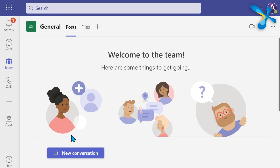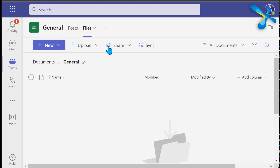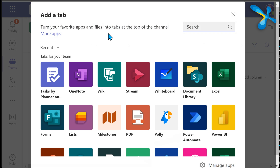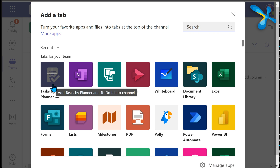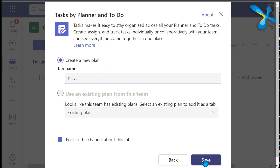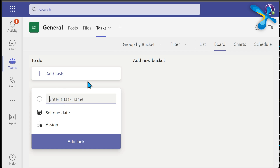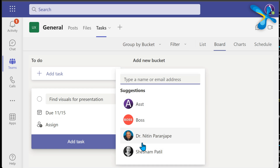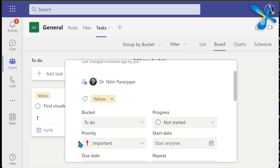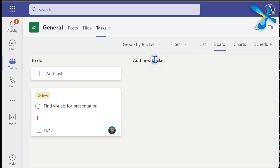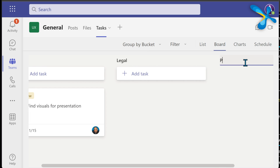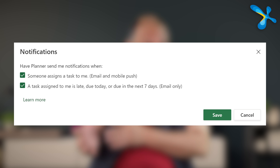In a Team you have conversations and files, but where do you add tasks? Click the plus sign and add Tasks by Planner — it's a shared task list. You can add a task, delegate it to project members, set a deadline, add sub-tasks, apply color coding, create buckets for various task categories, and more. The other person gets a notification and anyone can see the status live.